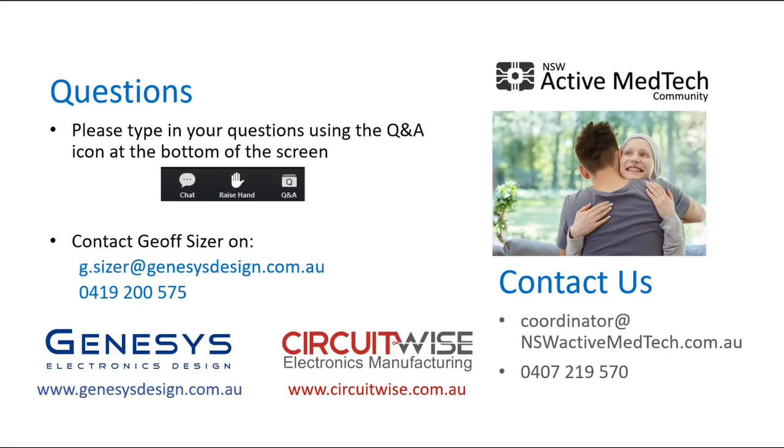Prior to that, you have to do the requirements capture and get all the stakeholders to sign that off. So it can be quite burdensome just getting everyone in agreement that the requirements meet the need. Then the other big chunk of work at the far end is the verification and validation testing. And I'm not talking about switching your circuit board on and making sure the LED flashes. I'm talking about absolutely intensively and rigorously testing every circuit module. Do the serial interfaces function with the appropriate clock and data rise and fall times? Are the logic levels correct? Are the functional aspects correct? Are the voltage supply rails correct? Can the voltages deliver the required current with some margin? Etc., etc., etc. So just a lot of detailed, rigorous work that simply takes time for the engineers to do.